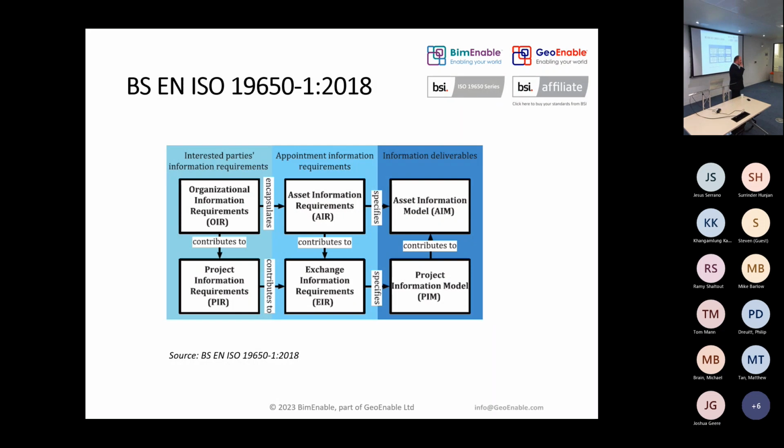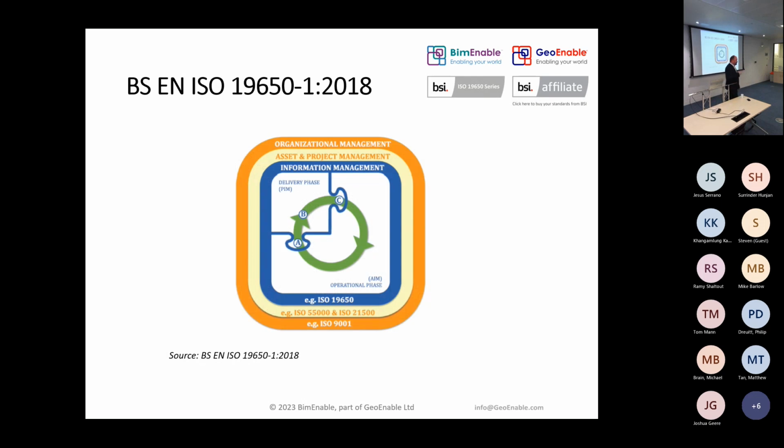I was on the Northern Line Extension project. I hope that's completely digital beyond Kennington loops, and I hope they've captured all the data, and that's fantastic, that everything at Nine Elms station and the tunnel should be captured digitally. I'd really love some feedback from anyone online or at TfL if that happens. So that's tick perfect. But in comparison, if we look at Victoria Station Upgrade, because I was in the chair for asset management, the asset engineer signing things off, I constantly had a pop at the project with my maintenance colleagues, saying you're giving us digital data allegedly associated with the new works, but it's no good unless you capture the whole station. And in my opinion, it wasn't difficult to capture the whole of Victoria Station because the new bit of the station is substantially more than the old. But no, the project and budgeting would not provide for that.